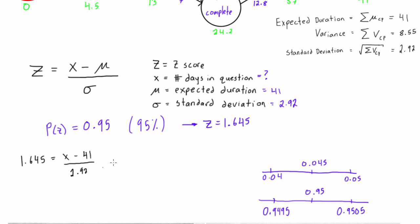If we rearrange that a little bit, we get 1.645 multiplied by 2.92, and we'll have to add 41, and that will return our x value. Just punching that in your calculator, our x value will be equal to 45.803.